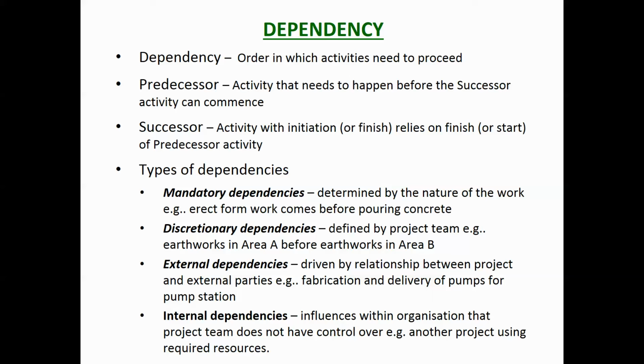team. So for example, you might have a long road or a large area of earthworks, and you only want to do one section at a time. You want to split it into 3 or 4 little sections. So you might say, well, in this case given here, we're going to do area A, this area here, and when we finish area A, when we've done the earthworks and we put the topsoil back on again, we're going to open up area B, and then when we finish area B, we're going to open up area C.